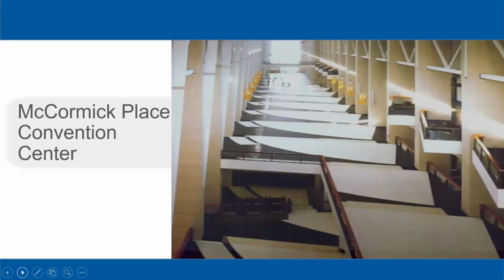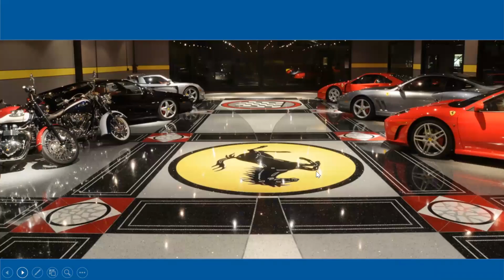I want to say maybe 30, 40 years old. It was one of the largest epoxy terrazzo projects at that time. And this is a very nice demonstration of an exotic epoxy terrazzo floor with lots of different inlays, lots of different patterns. Epoxy terrazzo, one color, one pattern, 5,000 square feet, wide open, is probably going to budget price at $15 to $20 per square foot installed.